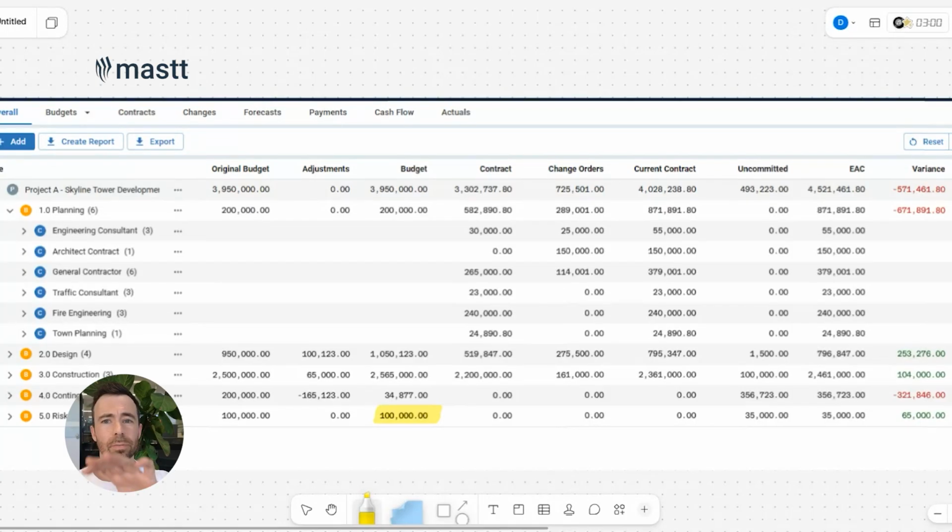So all of these checks can happen on one page, which is pretty amazing. So I can see the full financial health, check the forecast versus the budget, find packages of work that are potentially driving that big variance, see if I can cover those gaps with contingency, and now I can ask an informed question of the project, what are we going to do about it?